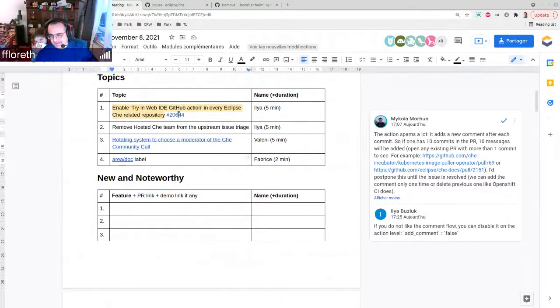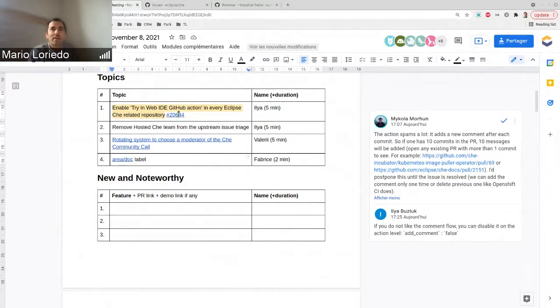But what is successful, I think, is that some members of the QE team work with the teams. They attend the stand up, so they are kind of part of the team, so that they can be updated in real time, and they know and can also update the team on the work they are doing. I think that is really effective.